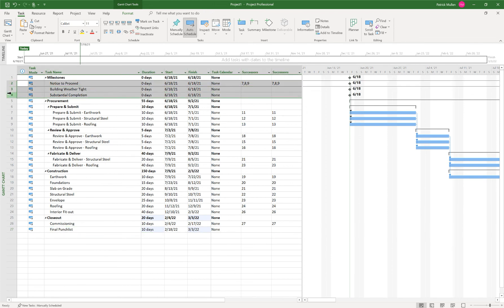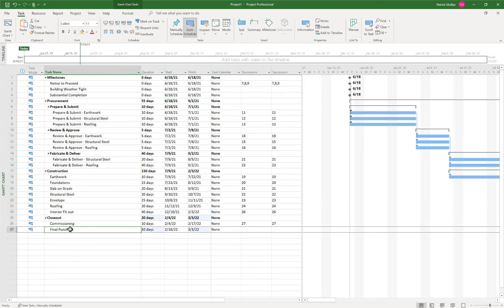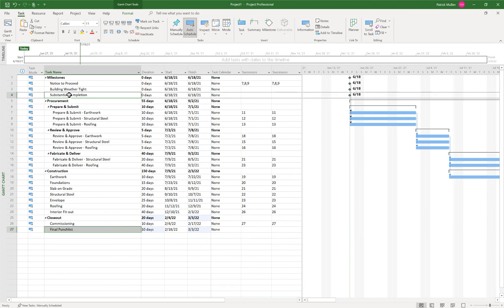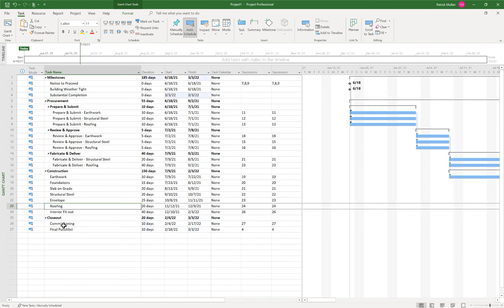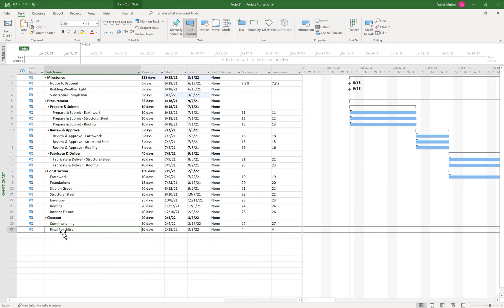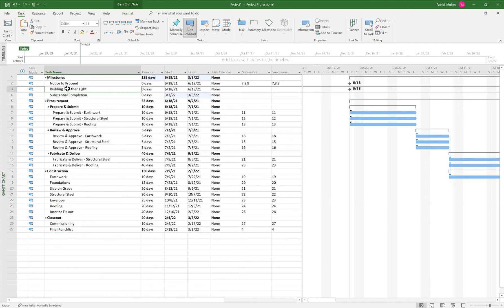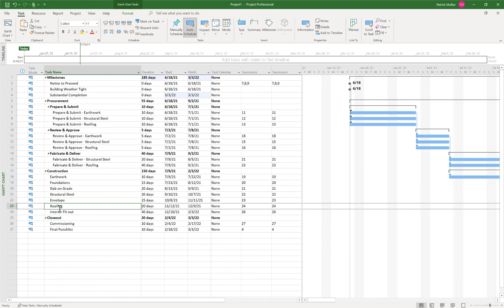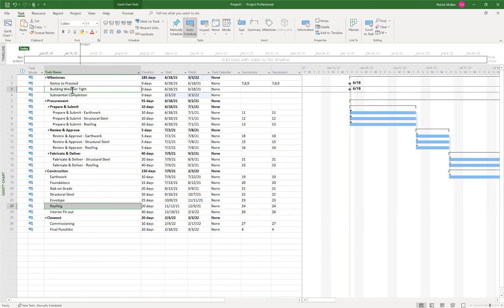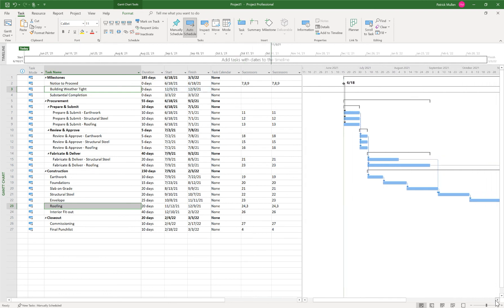So let's tie, I noticed now our milestones aren't tied in. So let's tie final punch to substantial completion. Link those together. And if you have the order that you click, so I clicked on final punch list first, held my control key, and then clicked on substantial completion. And in that order, when you click link, it'll add those relationships in the order that you click, which is kind of a nice feature. Let's do building tight after roofing. And there we go. We have our schedule now.